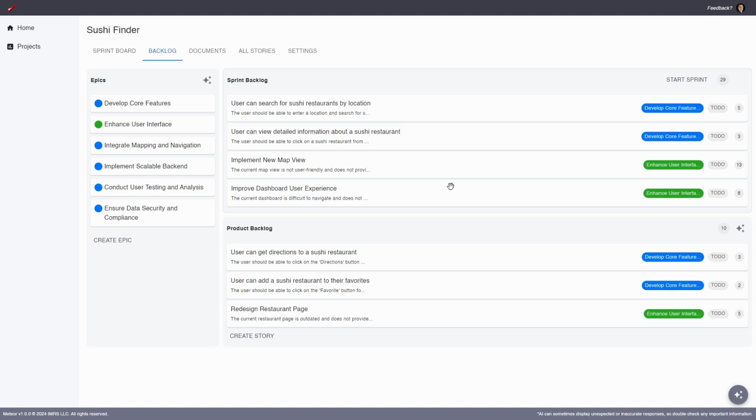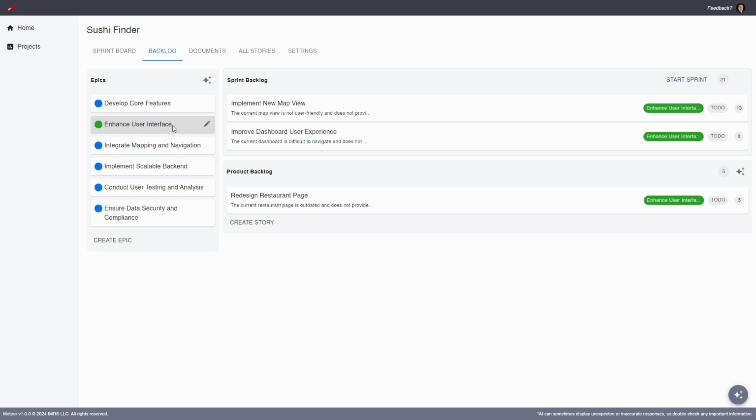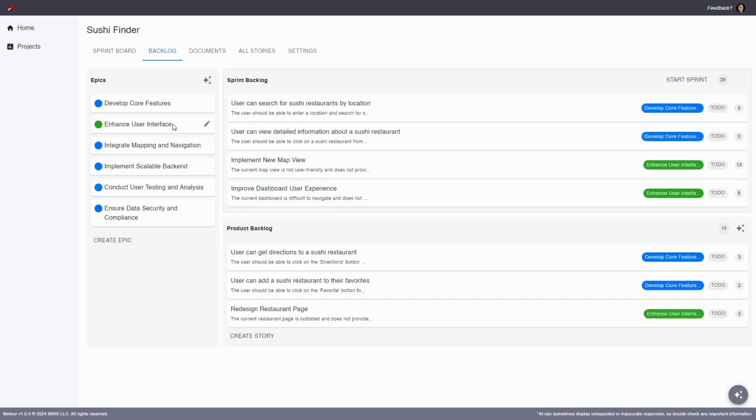One of the key things, if you've done a lot of sprint planning meetings before, is knowing the total number of points that you're planning for the whole team, which we roll up right here. You can see 29 is the total number of points that I have in these stories down here. And then, of course, we also roll up all the points for everything in the product backlog, which will look big once you have quite a lot of stuff in the backlog. Also, the point numbers will filter if you're filtering based on just one epic, right? So, something to know.